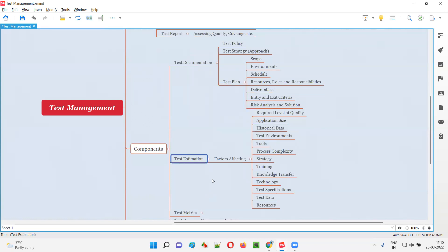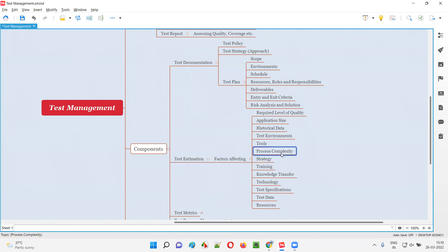Test environments — how many environments we have to perform testing also affects our estimation. If more environments are there, the testing will take more time. Tools — which tools we are using, whether we are using tools or doing it without tools — based on that estimation will be decided. Process complexity — how complex the project process is, which model we are following — everything will depend. Strategy — based on our approach of testing, estimations will differ.